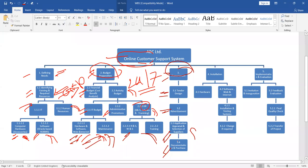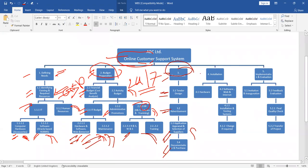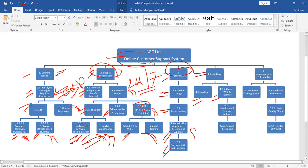And the last one, you will go for documentation and purchase. The whole process, the one task only, procurement, is divided into four tasks. And this way, everything is done, but now the time to installation, because you want to convert your shop into online shop. When installation, you need to think first hardware installation, then software, web designing and internet, then installation and testing of your website, whether it's really meeting the demand of the customers. And if any change required, then you have another task that change if required.